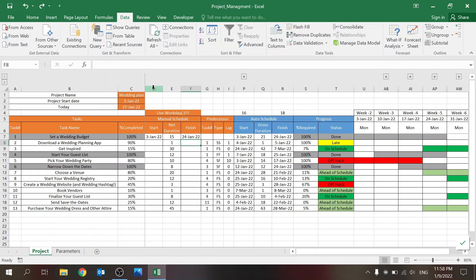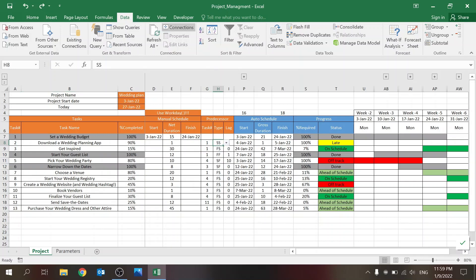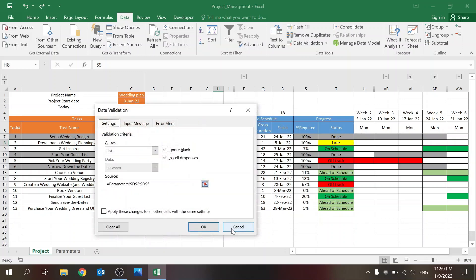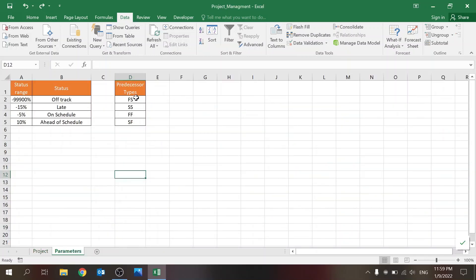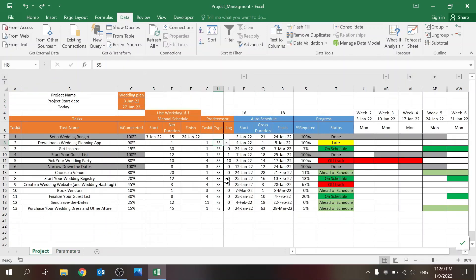Now we have the predecessors — here's where you define if a task has a predecessor. You write which task it's connected to, what type the dependency is, and here I'm using another data validation from the Parameters sheet where I set up the dependency type names.